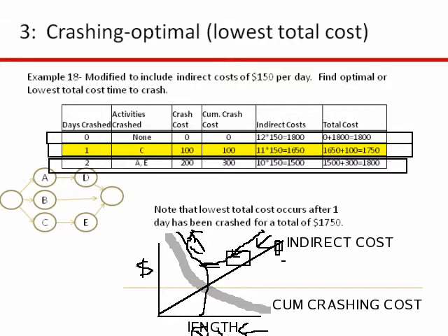The longest path is your critical path. The difference between that and the other paths is the slack. Okay, and if you just think about it as slippage, it is the amount of time that that path can slip without making the overall project late.